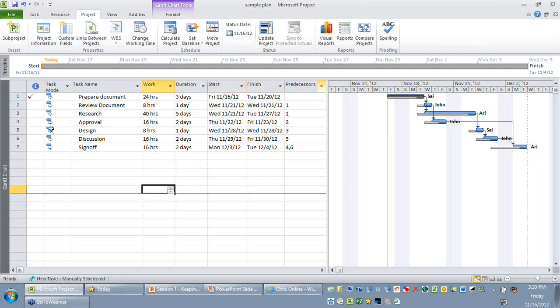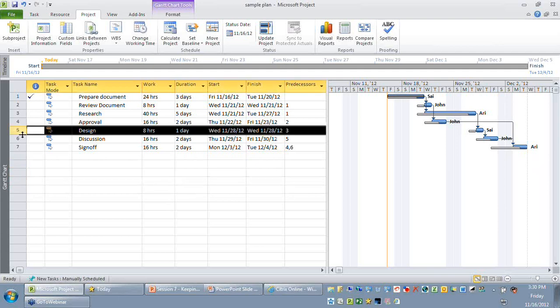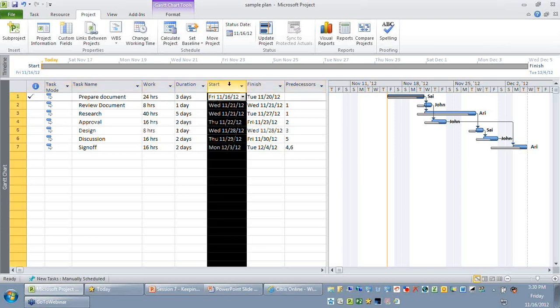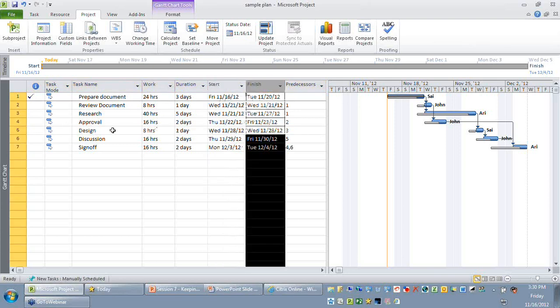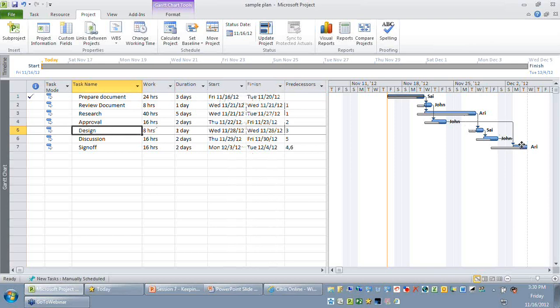The second step is we might want to include this change request now. But remember, before you add the change request, you need to remember what is your current start date and finish date of your activities. The reason is, after adding the change request and changing dependencies, you might see that there are certain activities that get delayed because of the change request, and the customer should be aware of those impacted activities.